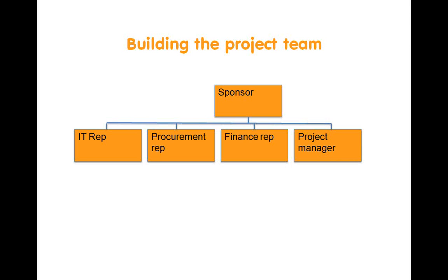It's key to have IT involved because a data flow will be coming to your organization, so they just need to be able to be comfortable with where that's going to go and how that's going to liaise with other technology that you've got. But after a while, they may step away from the project or the program and not be engaged anymore. Really, this is a procurement and a finance project. Procurement needs to be involved in a very, very big way. And I urge you that if you haven't yet engaged procurement and you're thinking about doing e-invoicing, stop now and go and get procurement involved. If that's one thing that you take away from this webinar, I'd be pleased that it would be that, please.